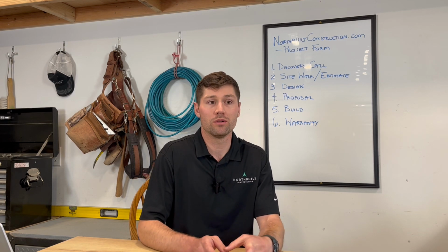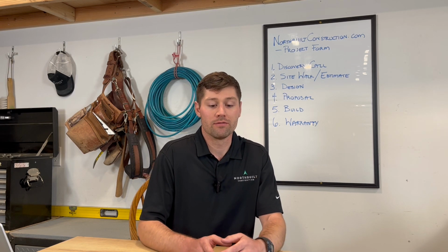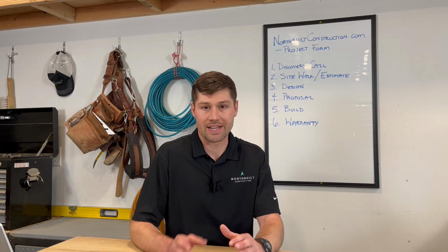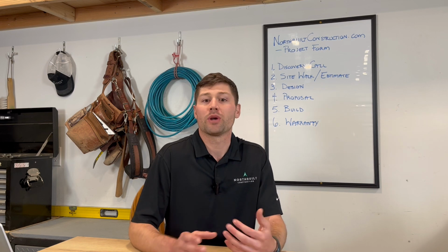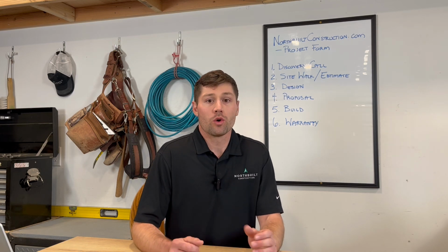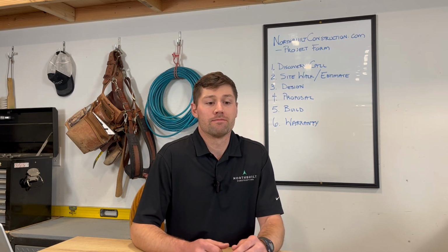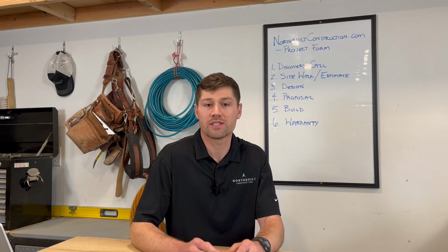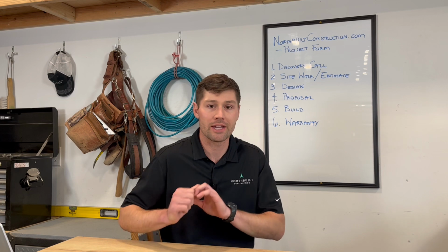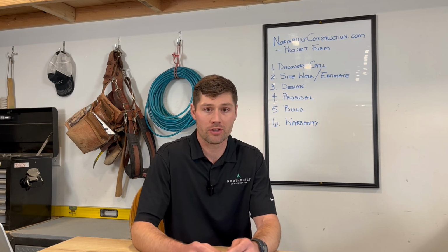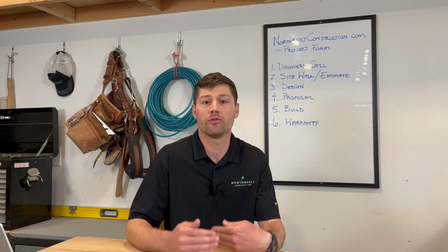And the estimate will have a broad scope based on everything we've talked about. And then we'll move to the design phase with a small deposit based on your project fee and kind of the size of that project and that amount and that budget. In the design phase, we will coordinate everything from selections, fixtures and finishes, parts and pieces, everything that's gonna come out of there and go back in there will be sort of broken down and put together so that you can get it in a digestible form.